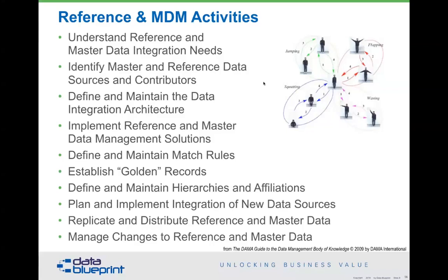So as I was mentioning before, the healthcare organization did not put this thing out there for everybody to do. They did a little bit. The first year they only had a few customers of their master data. Next year they got better at it. They added a few more. By the end of the third year, they estimated they had already covered about two-thirds of the organizational needs in that master data area. So, implementing it in little bits and pieces as opposed to a big bang approach.